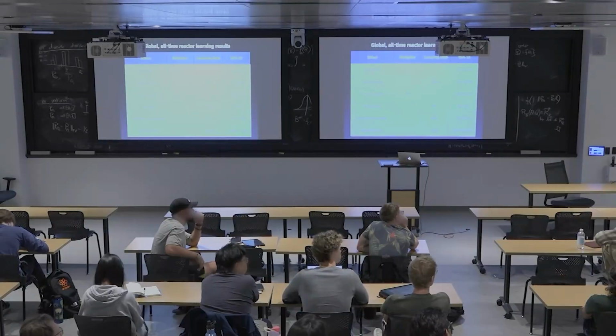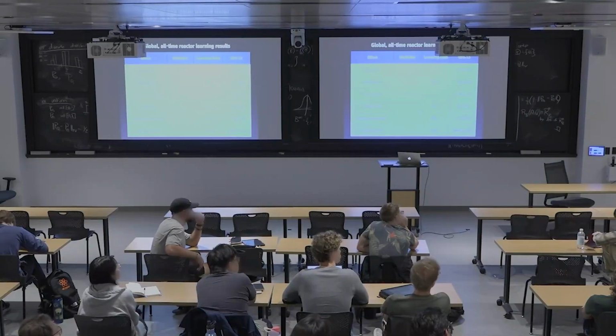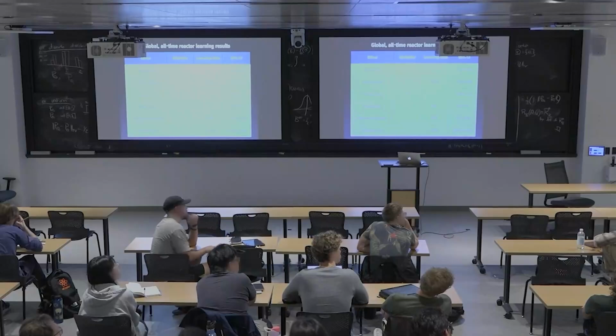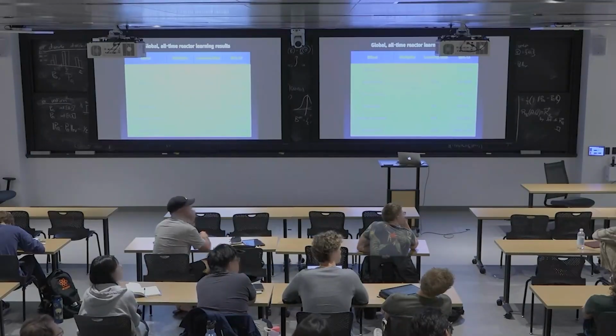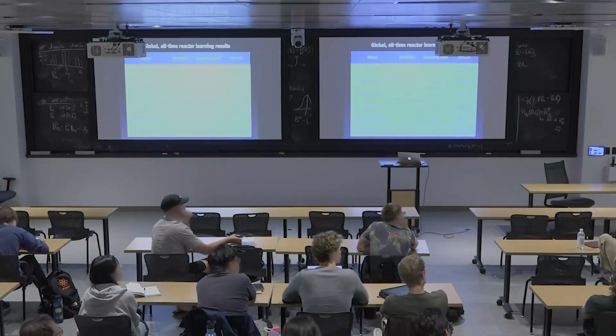So it was minus 3.84 doublings. And so then we want to know what is the change in cost. The new cost will reflect a 20% reduction, so 1 minus 0.2, or 0.8, to the minus 3.84. Because for every doubling, we have a 20% cost reduction, and we have minus 3.84 doublings. And this turns out to be 2.35.